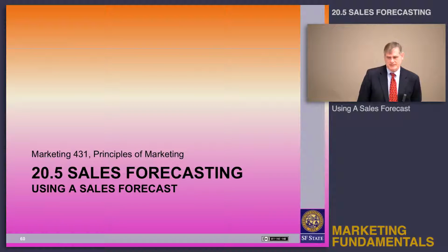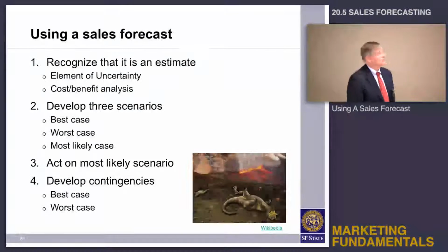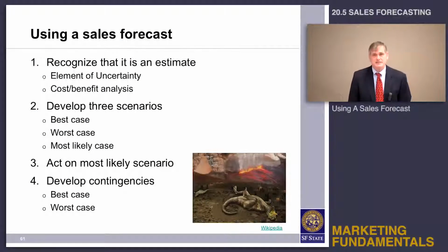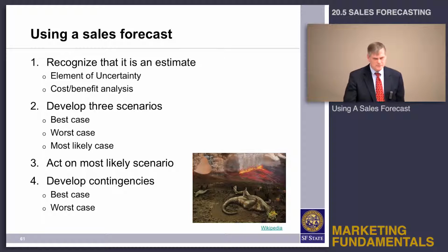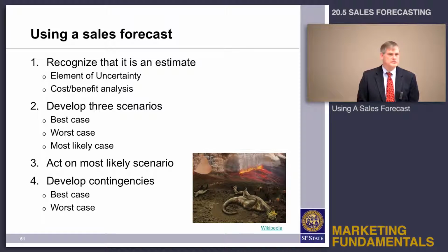So how to use a forecast? Well, one, recognize that it's an estimate. There's going to be some uncertainty in it, and depending on how much is at stake would determine how much effort you put into developing the forecast. And then you develop 3 scenarios. You've probably heard this before: best case scenario, worst case scenario, and most likely scenario.